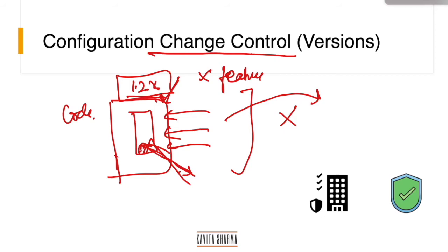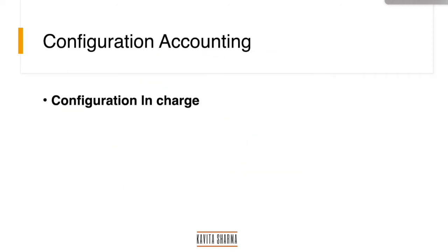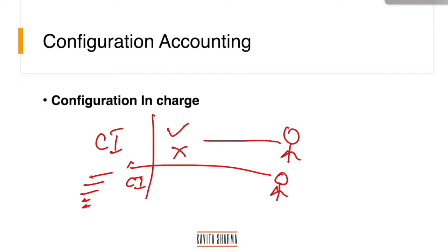Configuration accounting, as I told you, the configuration in charge based on the request gives the access or does not give the access to the CIs. Think it like a librarian. So there are a lot of books here. The librarian looks at what is the request. If it is available, gonna give it to these people or not, and then update the item.